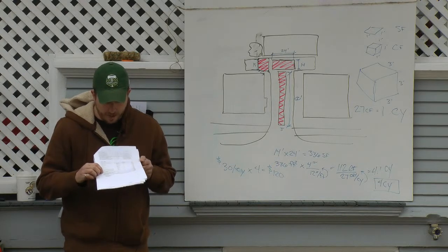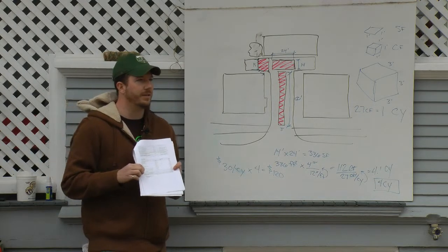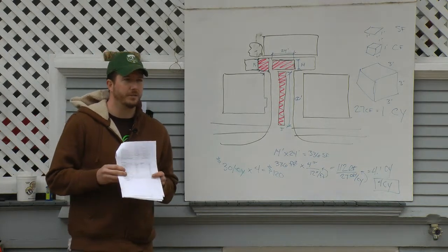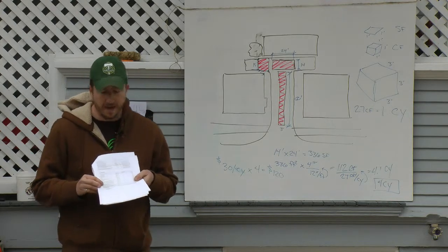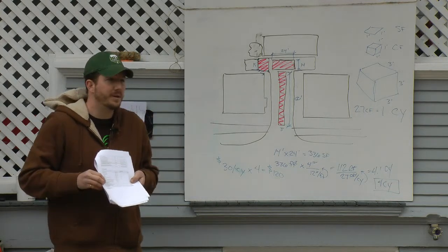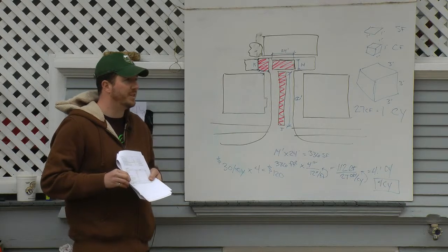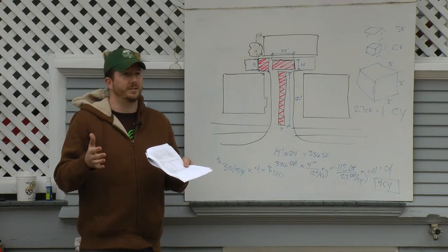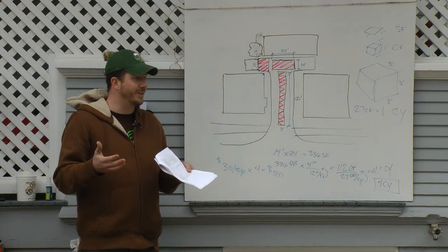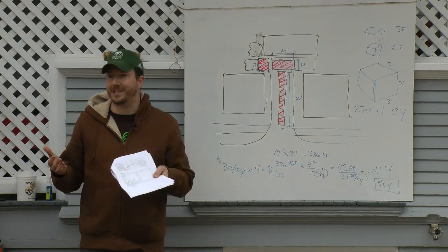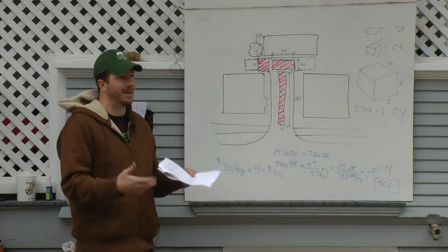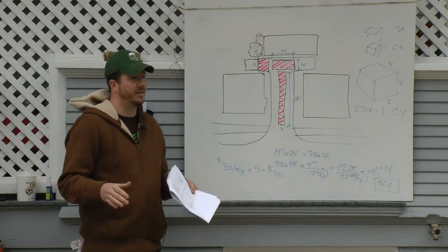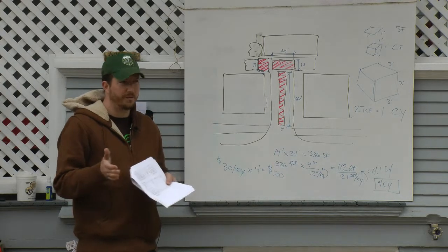Then at the bottom, we have some indirect costs, and these are things that are a little looser, a little more gray area, and don't directly contribute to the work. And that is, I have contingencies there. I think 5% is a really good place to go with contingency, but it's honestly whatever you feel comfortable with. Have a little bit of a slush fund there, because the name of the game in construction is that there's always unforeseen conditions. You're always going to come upon something that you may not have expected. Everybody that does construction always has some sort of fund set aside.